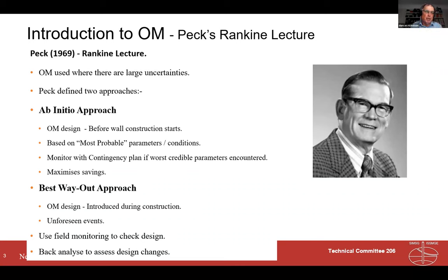He also identified the best way out. And this is where the observational method is introduced during construction for unforeseen events, and where we're using the monitoring data to feed into back analysis and varying the design.